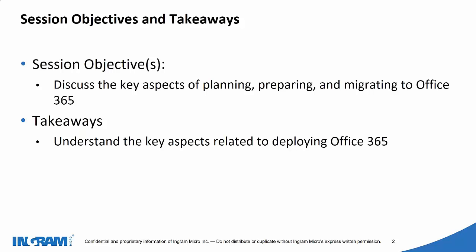That includes the first mailbox migrated, then the complete migration, and lastly the cutover part, which is the MX record change, so that after the MX records change they will be getting all the emails on the new Office 365 accounts instead of the old Exchange environment.